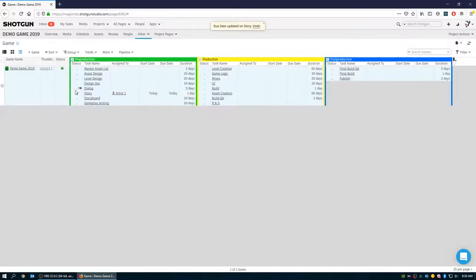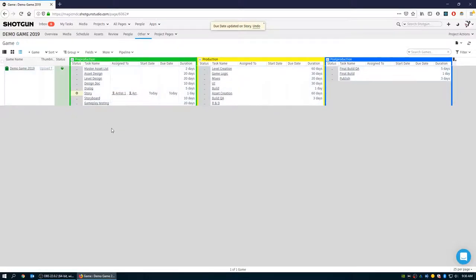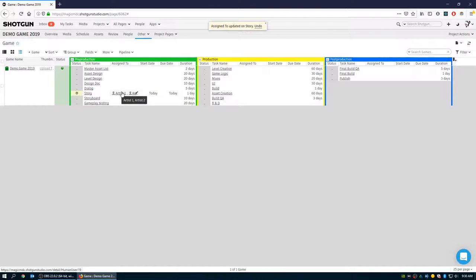I've made an assignment as the production manager: this person is going to work on this thing. You can also have multiple assignments — let's say Artist One and Artist Two are both going to be working on Story. When they're ready to start, they'll set it to 'In Progress.' The first part of production is identifying who's going to be doing what, making the assignments, setting the schedule, and then it's ready to go back to the artist. This pattern is repeated over and over for all tasks. Regarding pipeline steps, pre-production needs to happen before production, and post-production happens after production.